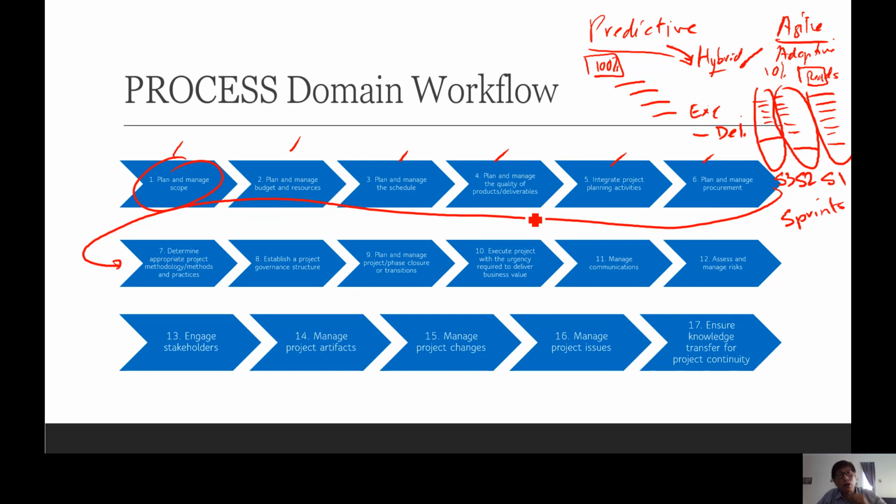So predictive is something like this. You construct a house. There's an SOP for constructing a house. You cannot build the roof before creating the foundation, right? It doesn't make sense. So you do it from the ground up: the substructure, the superstructure, and then the roof. Then landscaping and interior design may come in the later part.